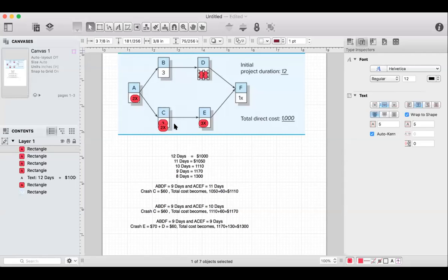Does that make sense? So one path must be reduced to the lowest extent. We're basically reaching the smallest possible. So reducing the project duration is about asking, can I still reduce the project duration? Now, let's say you try to make this shorter. Let's say you make this 1, 2 plus 3 equal 5, plus 1 is 6, plus 1 equals 7. But if you count here, this is still 8. So even though you're reducing that to 7, this is still taking 8. So the project duration is not actually reducing, because the project is still taking 8 days.